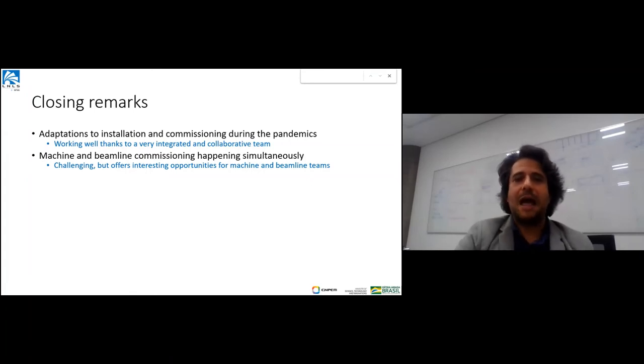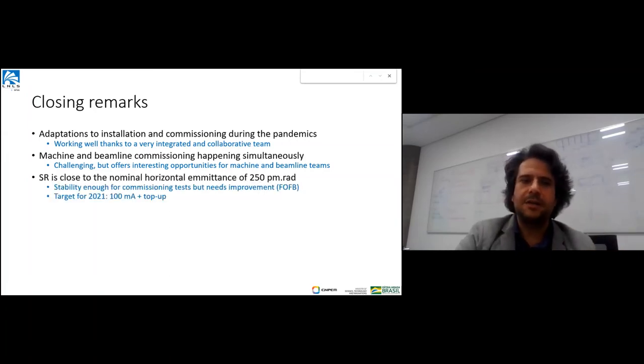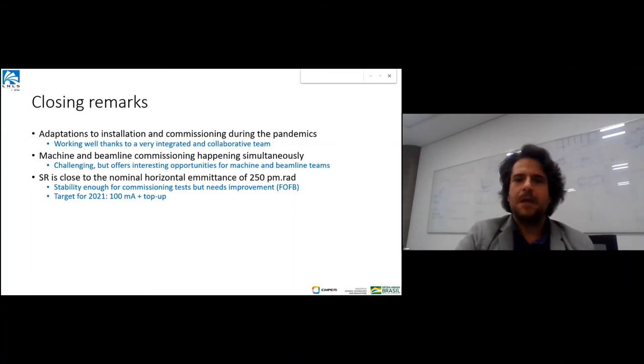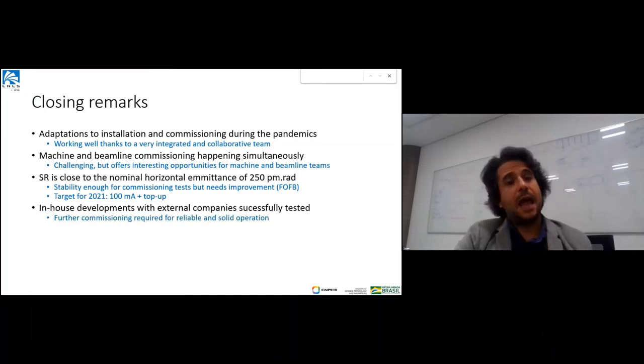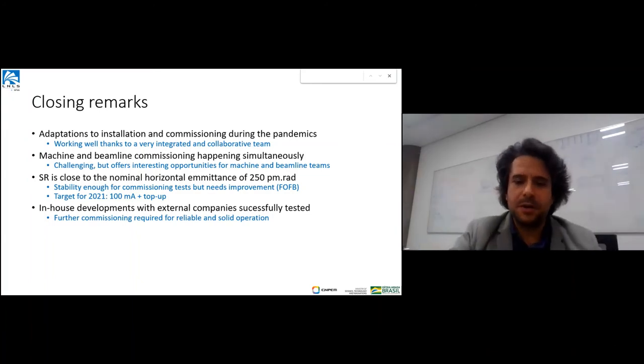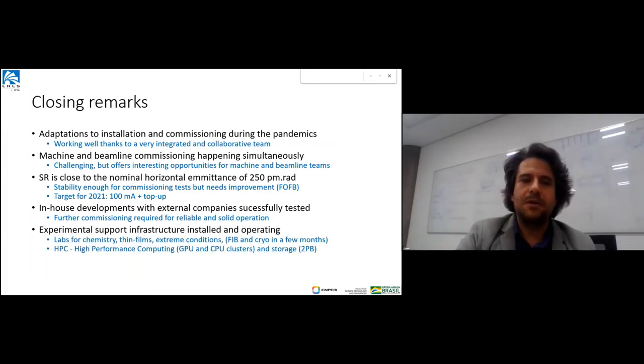Beamline and machine commissioning are happening simultaneously - challenging, but it offers great opportunities for understanding different aspects of synchrotron science. We're close to nominal emittance of 250 picometer radian. We still need to implement fast orbit feedback, and we expect by the end of this year to work with top-up at 100 milliamps. This is still not nominal current, but will allow most experiments we need. We've had lots of developments with external companies - they will soon be available for other communities.